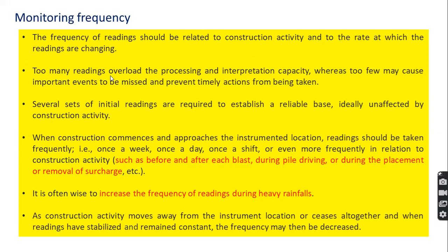In general, too many readings overload the processing and interpretation capacity, whereas too few may cause important events to be missed and prevent timely actions from being taken. So this is something very important. It is generally required to carry out a few sets of initial readings to establish a reliable frequency.